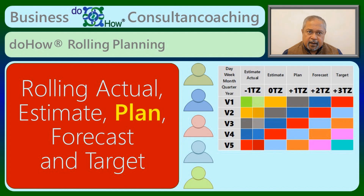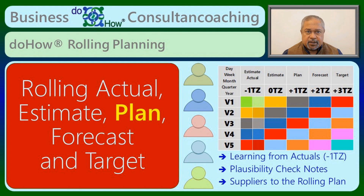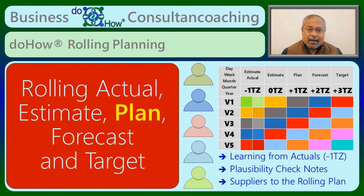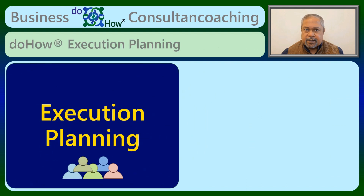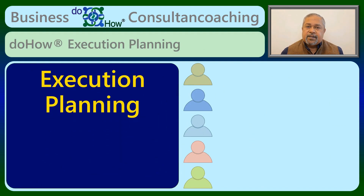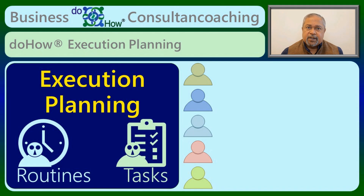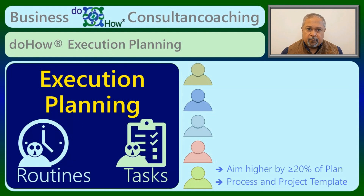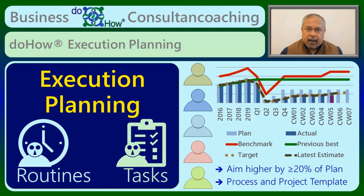Apart from planning, the key is to continually learn from the actual performance against the estimate and mandatorily make notes on the plausibility check done to make the rolling plan realistic — however, with a slight stretch as a motivator, so that confidence and trust gets built up over time by consistently fulfilling the plan. The execution planning is done by all the suppliers of the rolling plan by defining sufficient routines and tasks for getting the business processes and project toolkit templates ready, with the aim that the total contribution is at least 20% higher than the plan for taking care of all the unforeseen surprises and risks during execution.